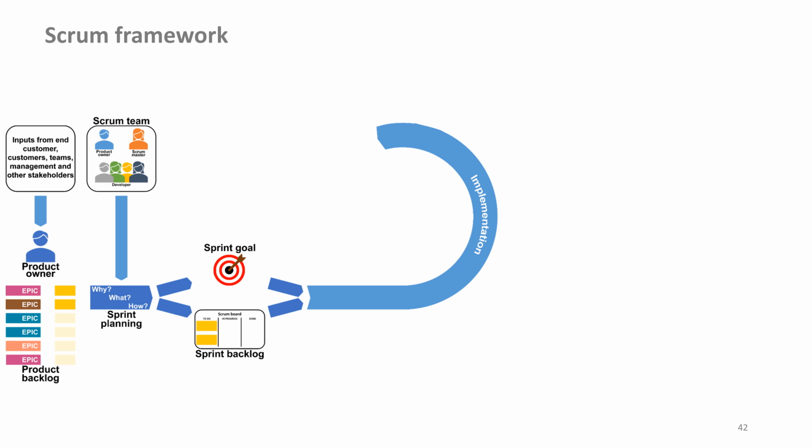In very fast-paced environments, there are teams that do daily sprints, which means they go through the cycle we see here every day. Every 24 hours, the team comes together and does a daily scrum. It is also called a daily stand-up. You come together for a maximum of 15 minutes. This means that there is a fixed time box here as well.